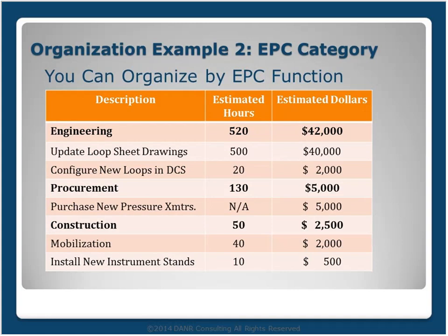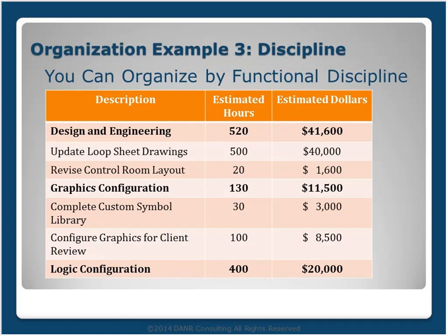But there are some challenges too. First, it's not readily evident what the linking and dependencies between the different tasks are. So that can sometimes be a challenge. And secondly, the change orders that might occur later in the project, where they're distributed across different functions, can be really challenging to integrate into the existing schedules and budgets. So that's something to keep in mind if you use this approach.